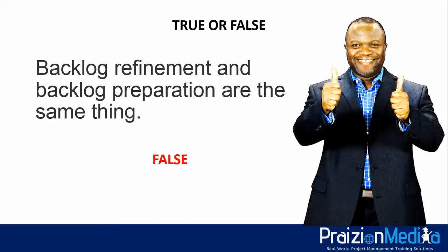Refinement happens in the middle of a sprint. Typically, it's meant to refine the backlog. Backlog preparation is referred to much earlier on. Think of this as the initial population of the backlog, and you can find this additional information, if you will, to better understand backlog preparation in the Agile Practice Guide.